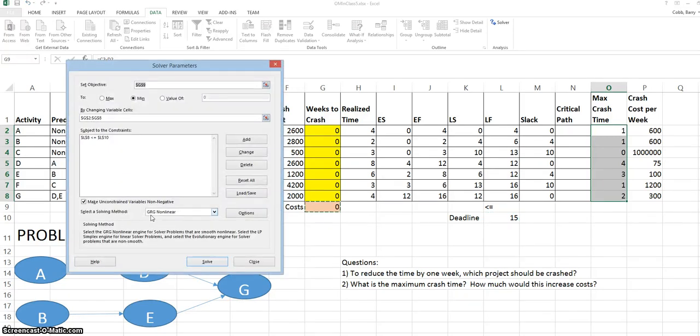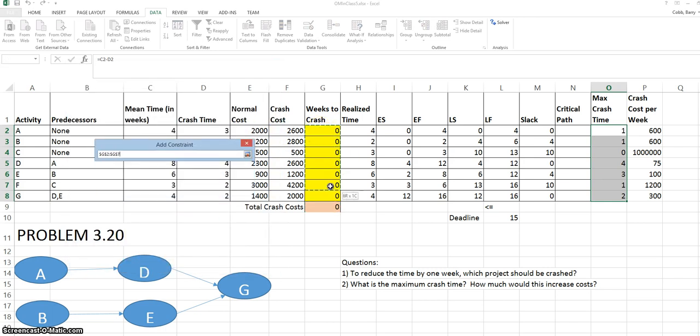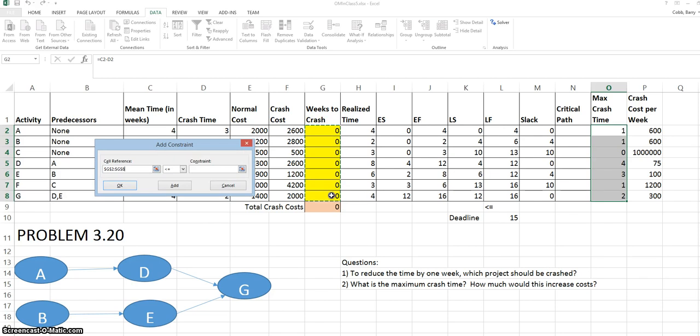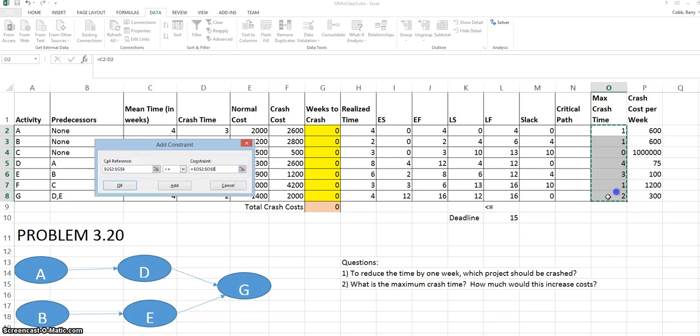To enter the maximum crash time constraints, we click Add. We put the weeks to crash in the left-hand side. And we can highlight the entire range. We use the less than or equal to symbol. We put the cursor in the right-hand box. And highlight the max crash time.